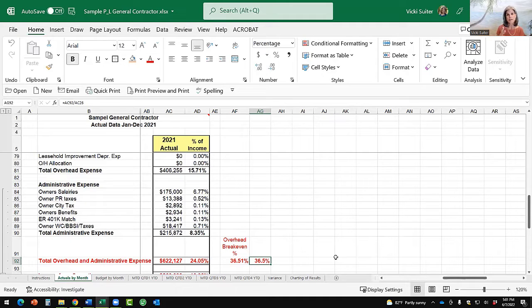Now, I want to speak about two things here for a second. One is, I hear all the time people throw around numbers like, well, it's 10 and 5 markups, or 15 and 10, or just random numbers. And oftentimes I hear contractors say, well, I can't be competitive in the marketplace if I show a 36.5% markup. And I totally hear that. So some of the things you're going to want to do is look at, okay, what is my biggest risk factor when I'm bidding? Labor. I'm going to have a higher markup on my labor than I am on other line items.